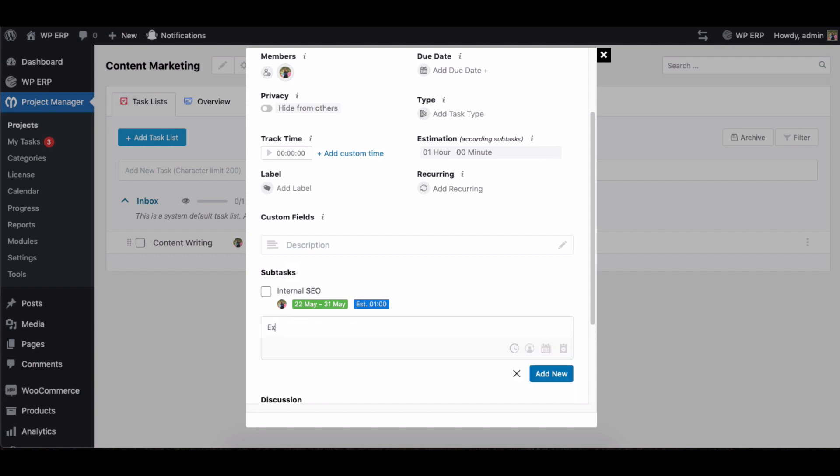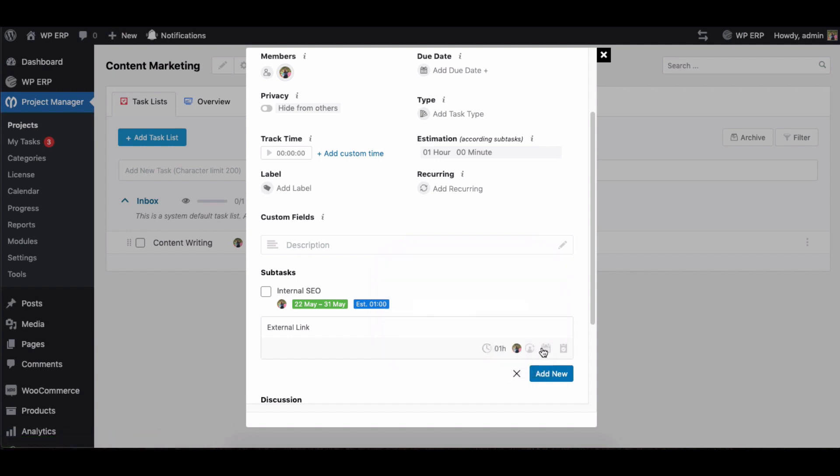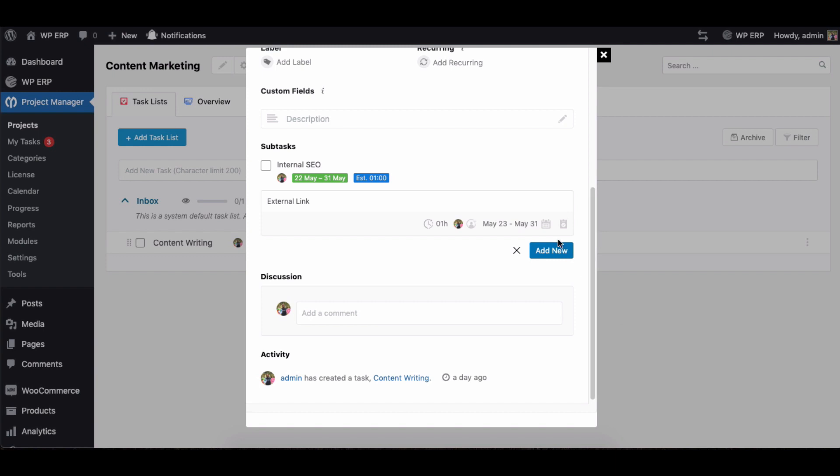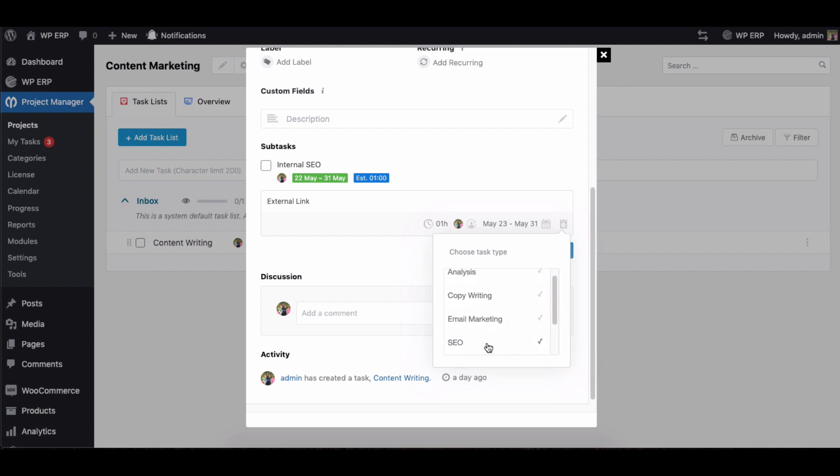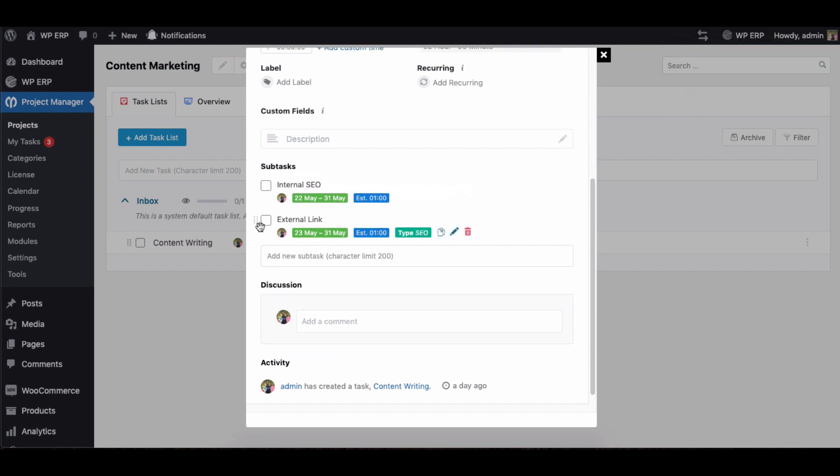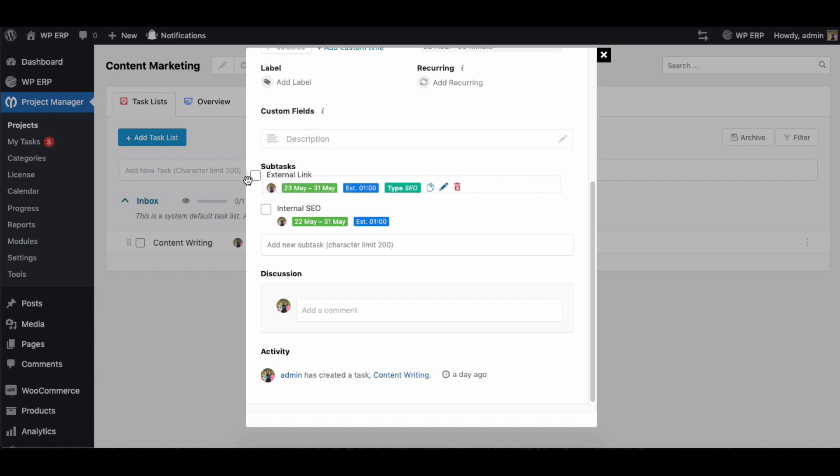Give your subtask a name, set the estimated time for the subtask, assign your coworkers, add the subtask duration, and select the subtask type. Once you're done, hit the enter button to create the subtask. You can rearrange your subtask position just by dragging up and down.